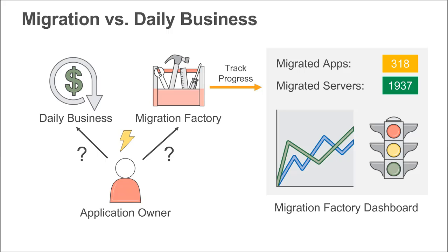On your IT resources, there will be additional constraints such as the same network bandwidth that was used to serve your business traffic is now also supporting seeding of data into AWS in preparation of the migration. And therefore, given all such constraints on human resources as well as your IT resources, what is significant during a migration phase is that you set up a very good governance and communication framework.